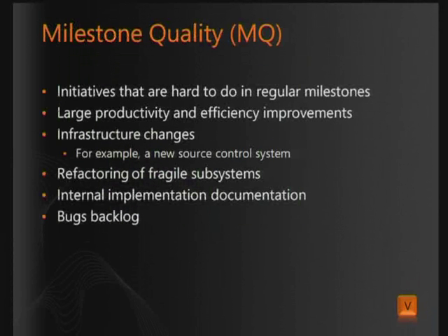From time to time, we have a separate milestone that we call MQ. Regular milestones start with M0, which is a planning milestone. We do the scenario planning that I talked about before, and so on. Then we start development milestones, which include the design, architecture, and development. So we would have milestone 1, milestone 2, 3, 4, and then we would, let's say, ship.